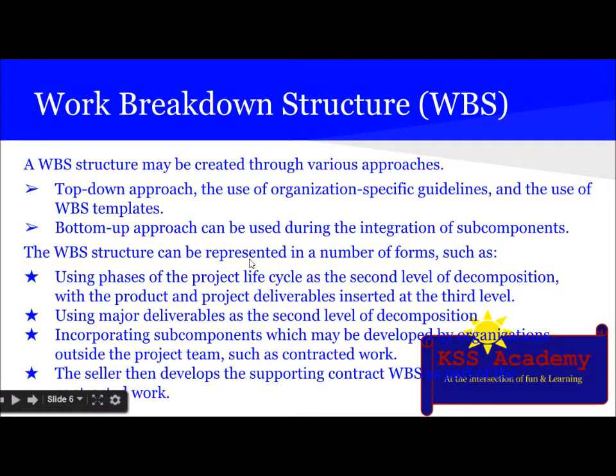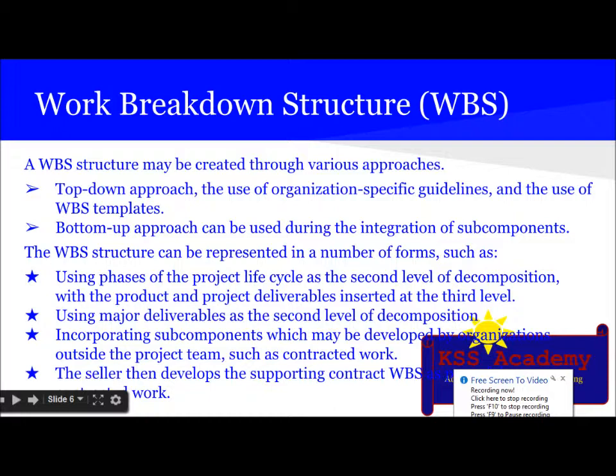The WBS structure can be represented in a number of forms, such as using phases of the project life cycle as the second level of decomposition with the product and project deliverables inserted in the third level. Or using major deliverables as the second level of decomposition, incorporating subcomponents which may be developed by organizations outside the project team, such as contracted work. The seller then develops the supporting contract WBS as a part of the contracted work.